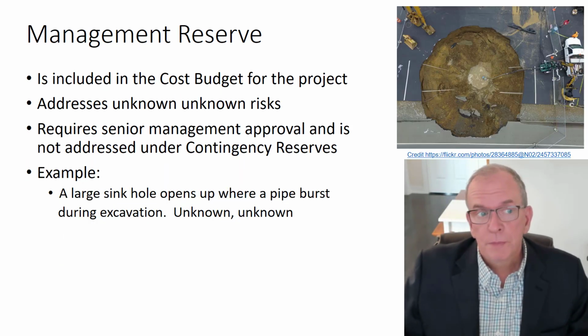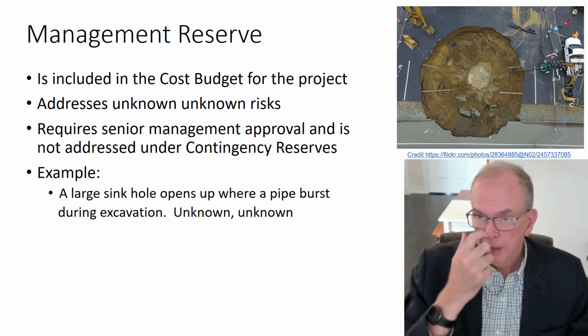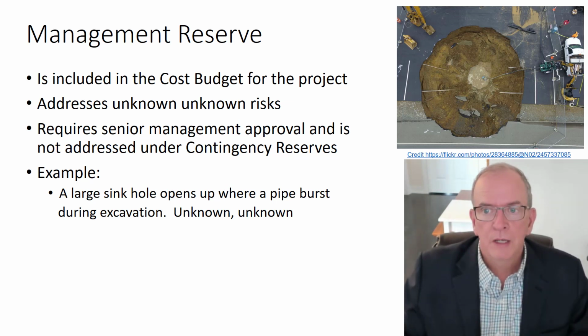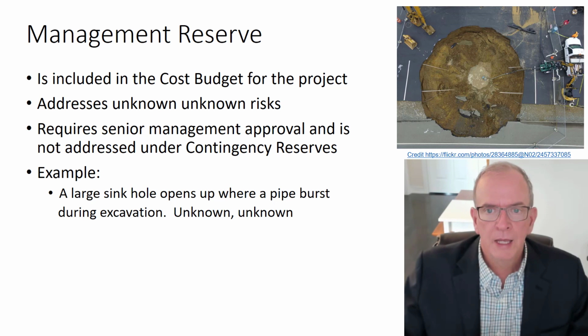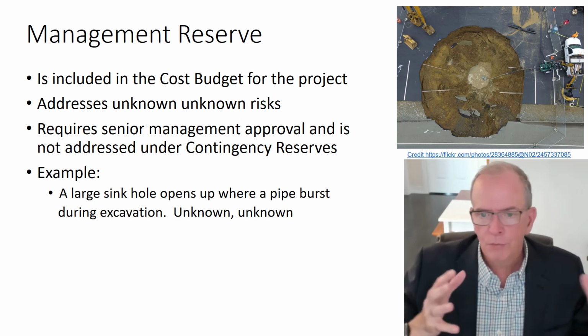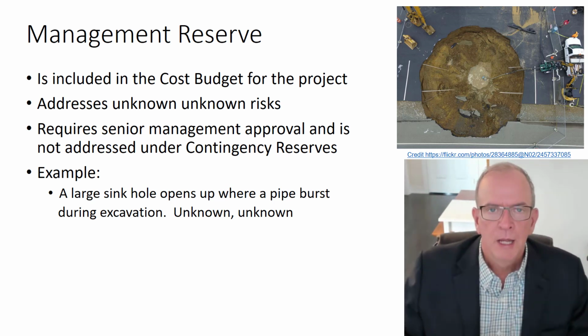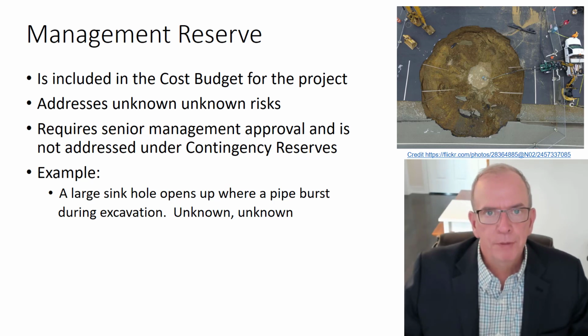Management reserve, as opposed to contingency reserve, is for the unknown unknowns. I've got this picture of a sinkhole here. It's not the one that I had in mind, but there was one in Ottawa where they were putting an LRT through downtown Ottawa, and a giant sinkhole, in the most prominent location, appeared. It was likely a pipe that burst.